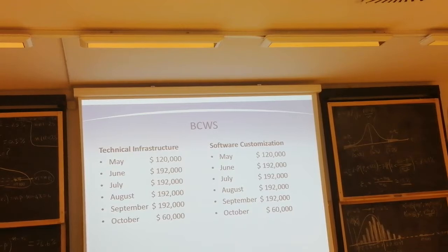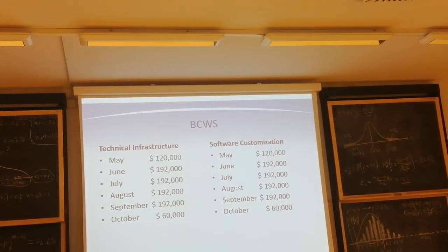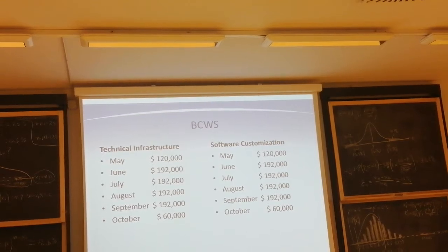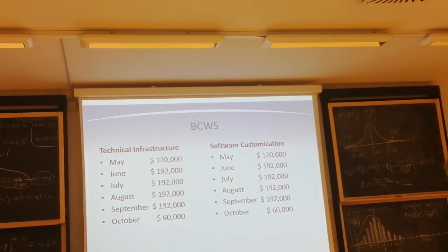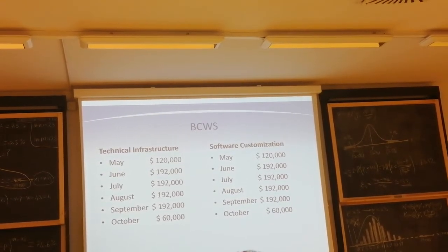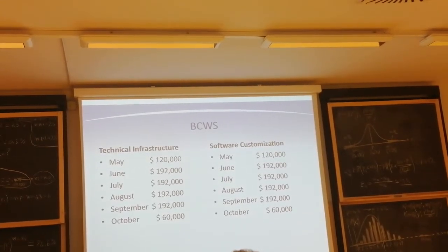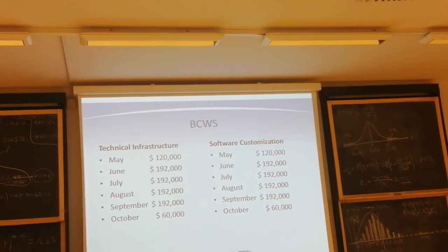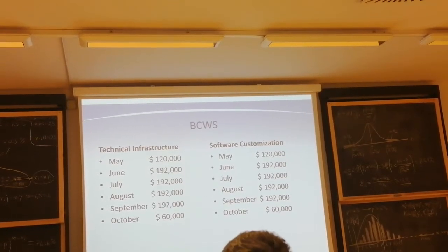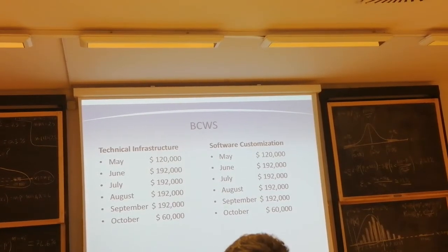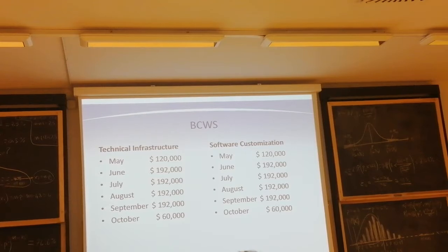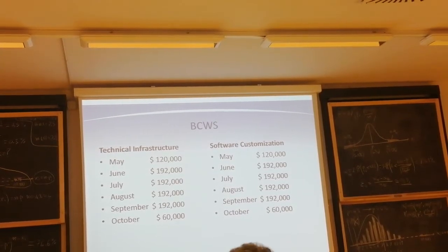We need to compare the actual cost of the work performed, the actual money spent for doing what you did, with the budgeted cost of the work performed. This one is based on the original budget, the value of what you did, literally how much work was done.